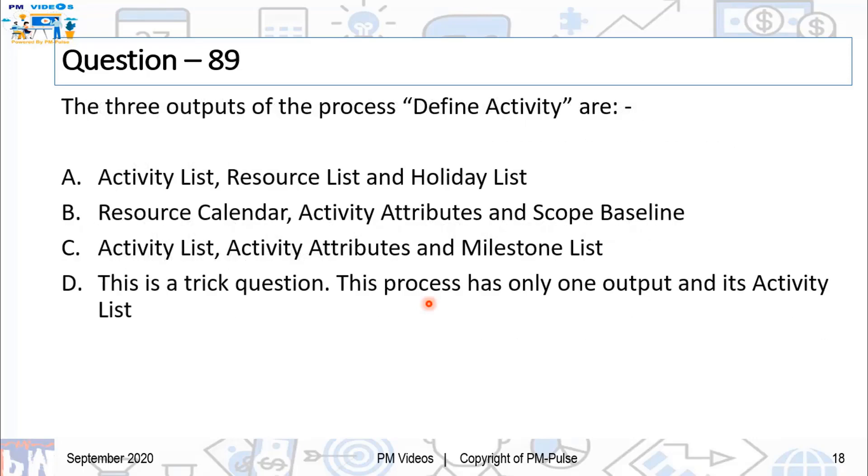Let's move on to question number 89. The three outputs of the process define activity are A, activity list, resource list, and holiday list. B, resource calendar, activity attributes, and scope baseline. And C, activity list, activity attributes, and milestone list. And D, this is a trick question. This process has only one output, and it is activity list.